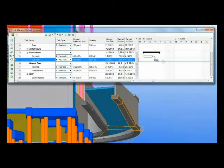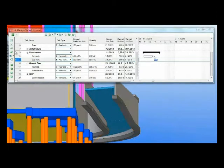Notice also on the Gantt chart to the right, that's increased. That's because you've got a planned production rate, and now you've got a planned start date, a planned duration, and a planned end date. And that's all based on the kind of figures you're putting in, the historical data. That's the kind of thing that you guys would know how your company works, better than I do.